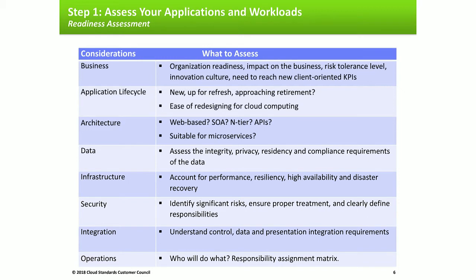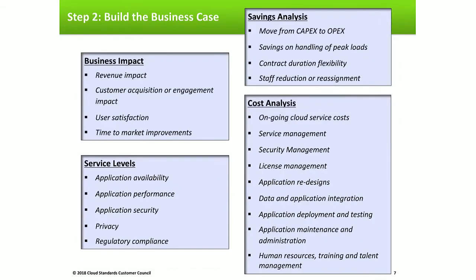It is not in a silo, right? There are so many other things which are going there. We have to factor in that cost, and then we have to factor in the cost after we take it to the cloud, right? So the cloud service management, the security aspects, the license management, the designing of the application, the protection of the data, application deployment and testing, application maintenance, and also retraining your resources, right? Retooling and retraining your resources become equally important here.